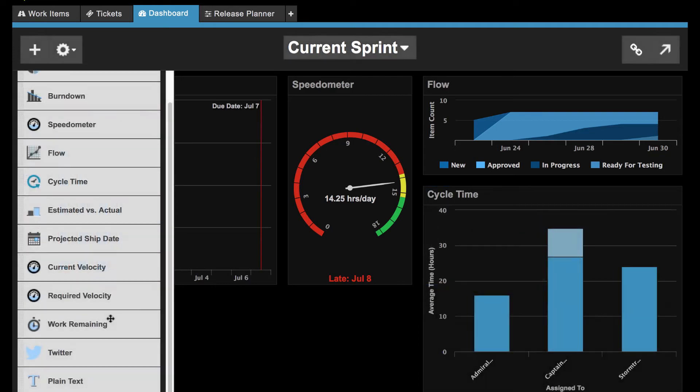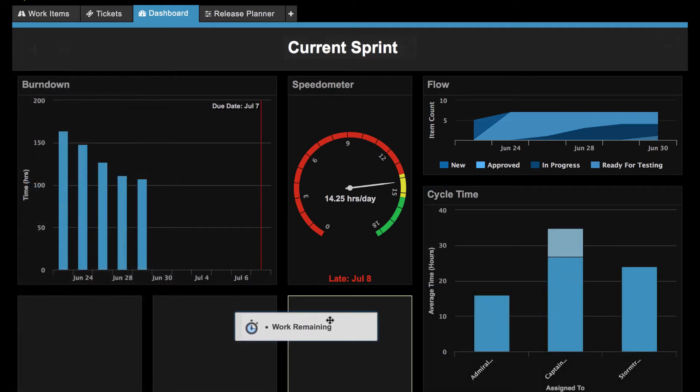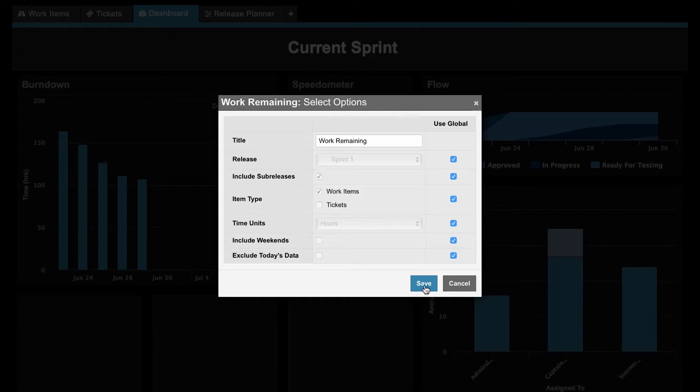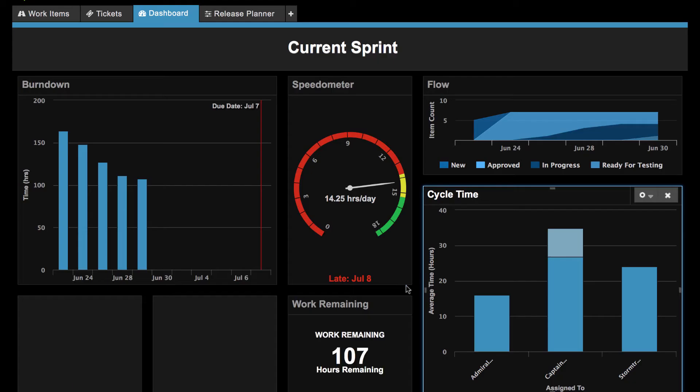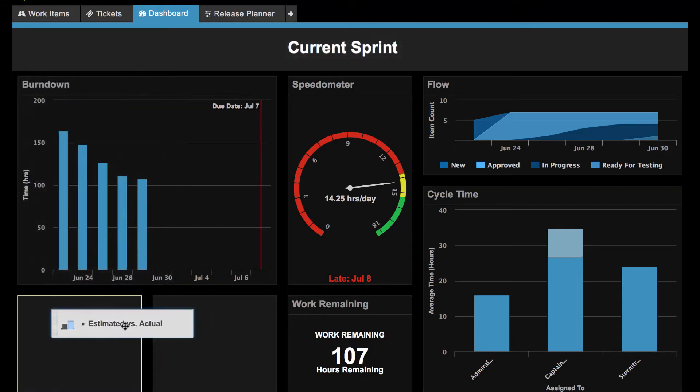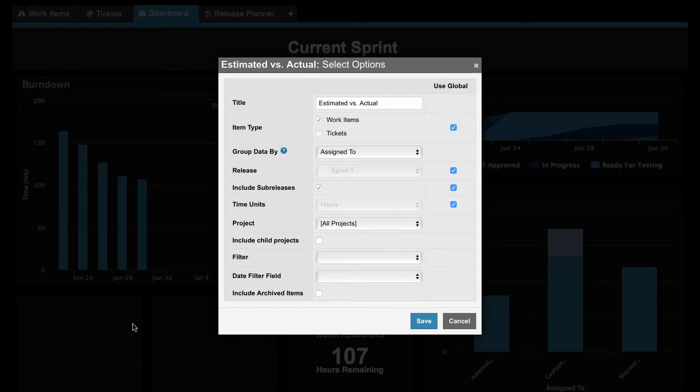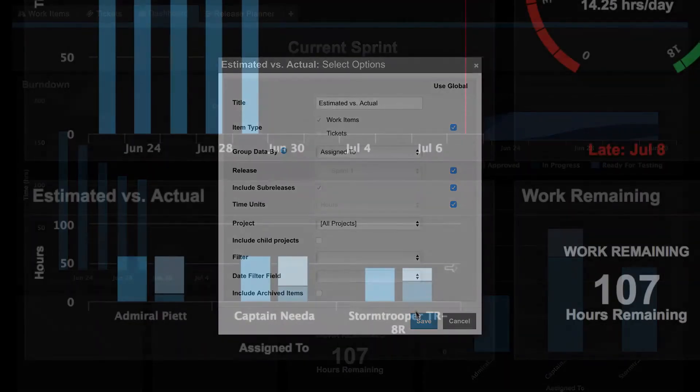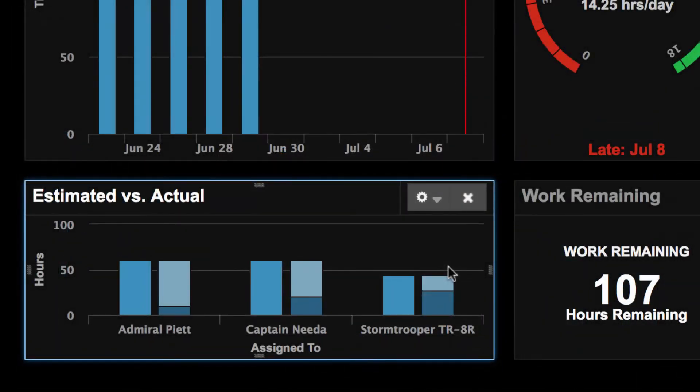Work remaining totals remaining estimates for your selected release, and the estimated versus actual gadget is great for retrospectives as it compares your initial estimates with what actually happened.